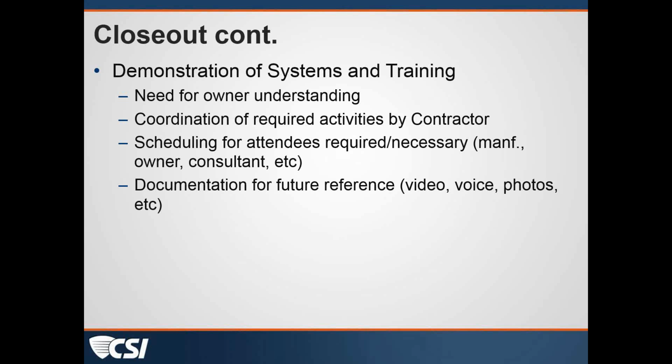Yeah, I actually worked on a project, with a close personal friend who has done some large water and wastewater work. They do have BIM models that they have allowed the contractor to update as record drawings, but then they capture that information and verify it themselves before they turn that over to the owner.